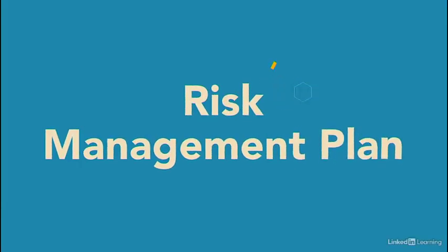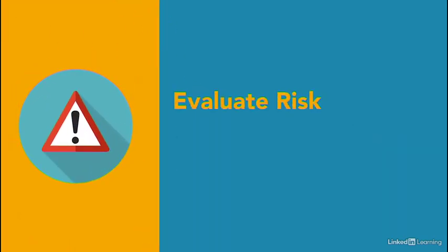A risk management plan documents which risks you're going to worry about and how you plan to handle them. First, identify which risks warrant managing. Start by evaluating how likely they are and how serious their impact would be.